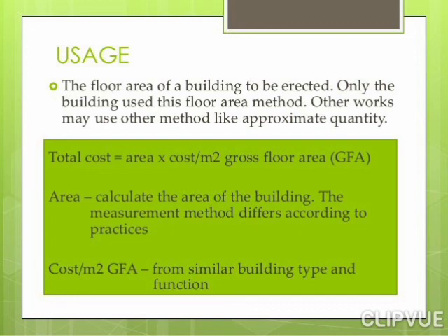Total cost equals area times cost per meter square of gross floor area. Area: you have to calculate the area of the building. The measurement method differs according to practices. Cost per meter square from a similar building type and